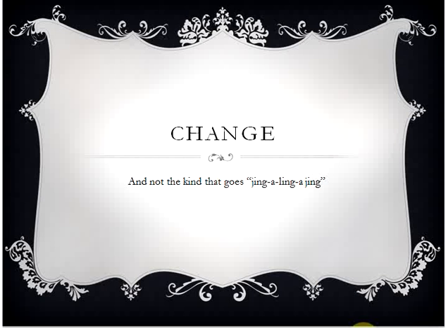The last part of change control is obviously the maintenance piece, and that's something to think about. The change itself may be minor. It may make your end users happy, but if the maintenance is going to require twice the work resource or twice the work effort every time a new medication is added to the system, since medications are added regularly, then maybe all of the logic and the change that they're asking isn't the best change to make. And maybe you need to have a discussion about a different way to make the change, or come up with some out-of-the-box thinking, because the maintenance alone can prevent the change from being reasonable.